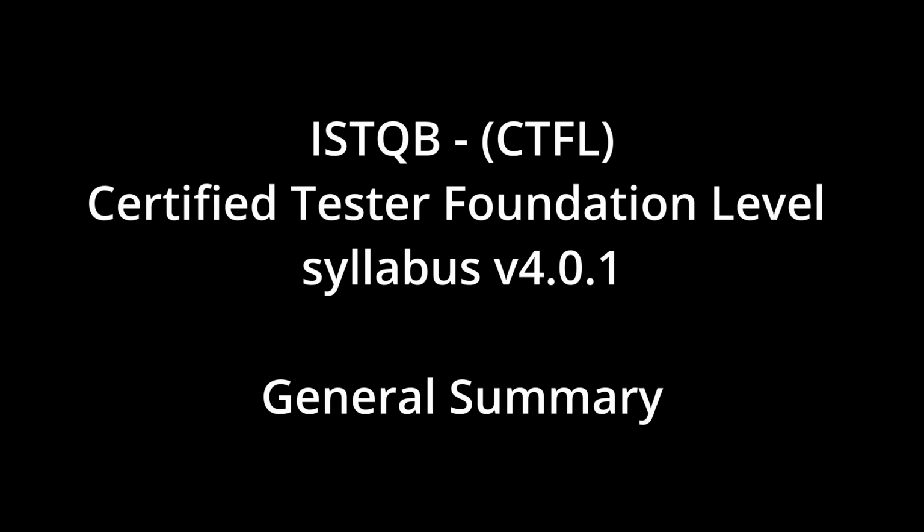You mentioned entry and exit criteria as part of the plan. Can you clarify the difference again and why they're important? Sure. Entry criteria are the set of preconditions that must be met before you can effectively start a specific test activity, like system testing or performance testing. If you try to start without meeting them, maybe the test environment isn't fully configured or the software build fails basic smoke tests, the activity will likely be much more difficult, costly, and risky. You might waste a lot of time.